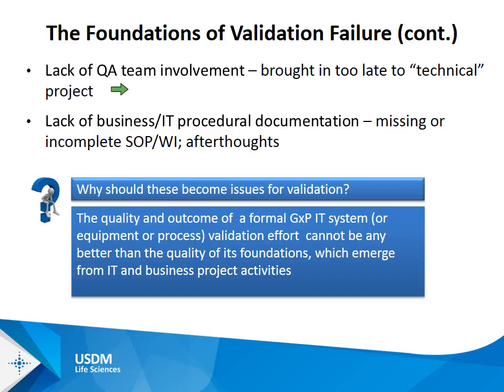QA team involvement. Just as validation is something that is thought to be more painful than the benefits in many cases, you find the QA team is often not involved until late in system development projects, either because everyone thought you wouldn't have to validate the system under consideration, or because people would just rather avoid the issue. So often you see situations where a major enhancement is being led by IT. The business considers it a technical project primarily, and QA is not involved in the original discussions, and this often leads to surprises as well at the end.